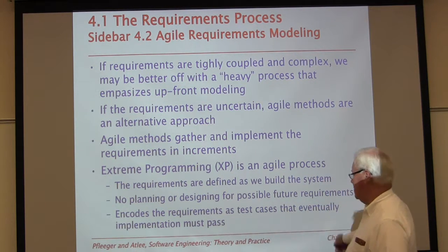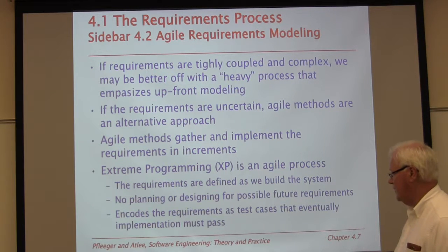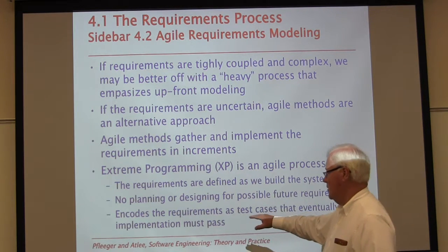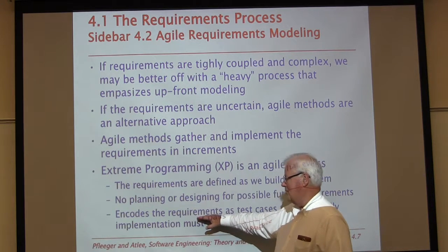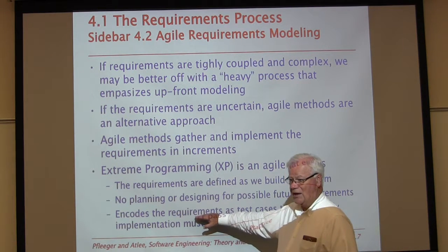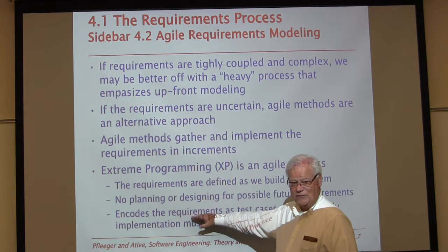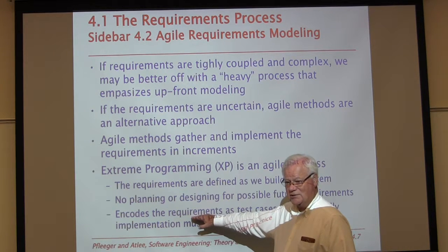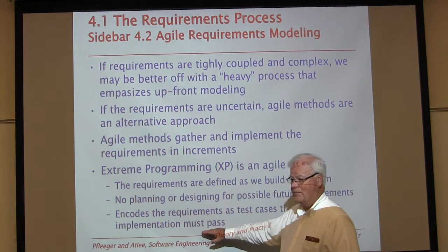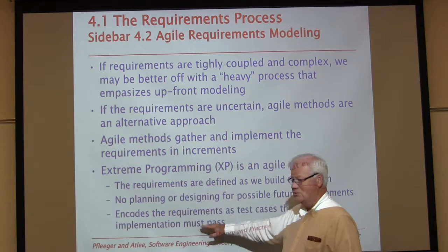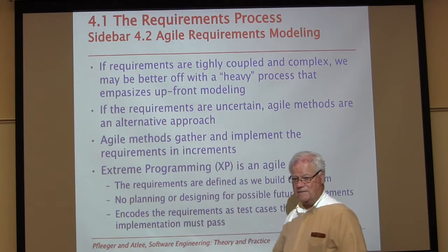It encodes the requirements as test cases that the implementation must eventually pass. So what we do is we take the requirements and we actually plan to those individually as test cases. And as we're going through our testing phase, we use those requirements as our tests.